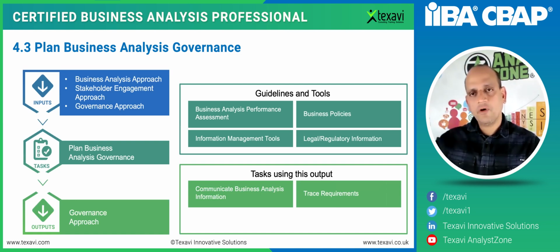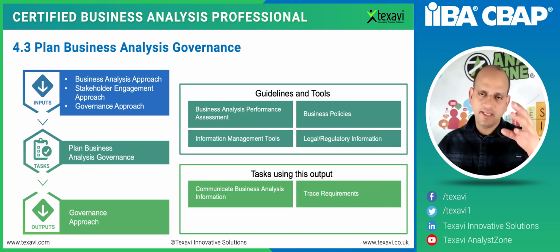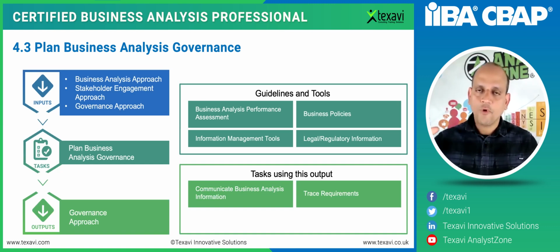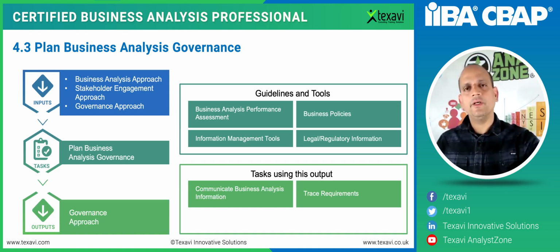So tracing the requirements from the stage they are identified as something to be done, like customer feedback, and then that goes into the requirements repository or product backlog, then the architecture, then the high-level design, then low-level design, then the development, then testing, and then deploying, right? So this whole thing, from requirements all the way through to the test cases and finally the code that has been released, is what we call forward traceability. So that is forward, it's going from requirements forward.